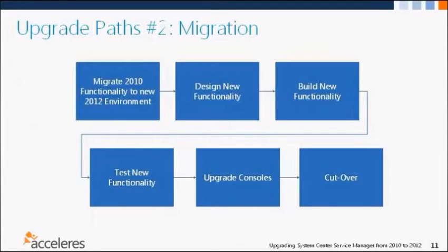And then once we're happy with the functionality, you would upgrade all of the Service Manager 2010 consoles and send out the name of the new server that everyone's going to connect to and have your cutover to the new system. So in terms of planning, there's certainly a lot more flexibility and capability here for cutover. Cutover is a little bit less intensive here.